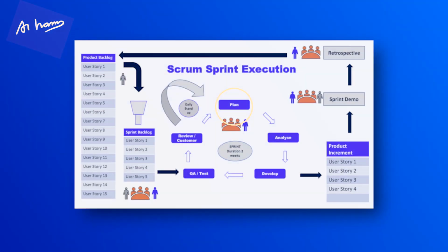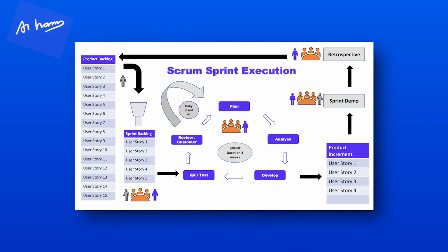We have got the sprint planning meeting. A sprint planning meeting is one in which you work with the product owner, the development team and the Scrum Master together. Everybody comes together to estimate the stories, they prioritize what needs to be done, and then they start decomposing the stories, making sure of the details of the stories, right? And add the stories on the sprint board, estimate them, make a plan for this and deliver the stories over the next 10 days. That's what's happening in the sprint planning meeting.